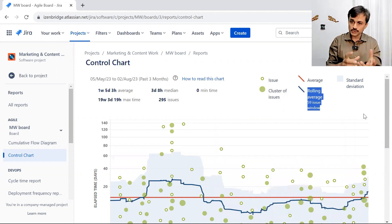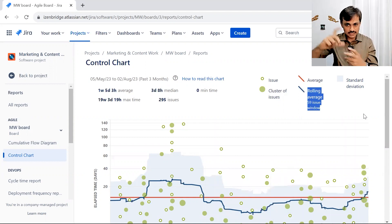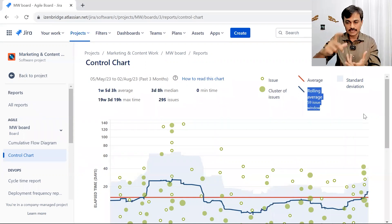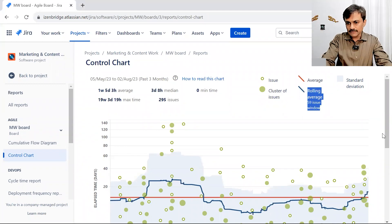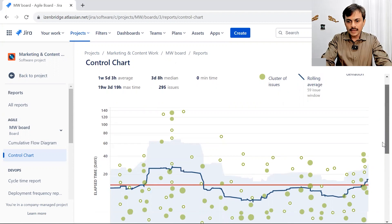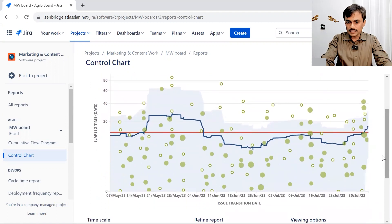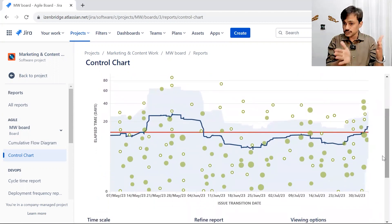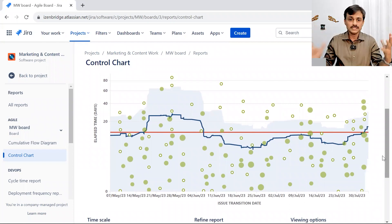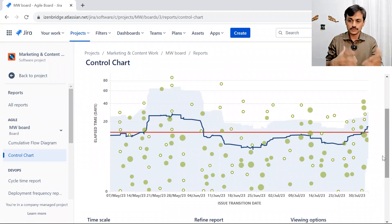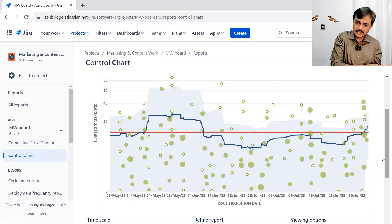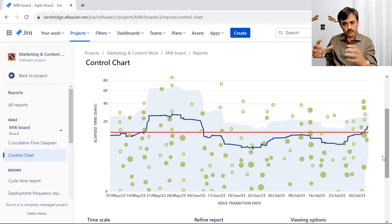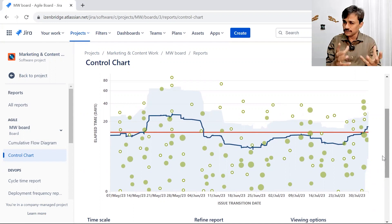Now, standard deviation. As you know, standard deviation is a factor showing how a particular instance is deviating from the mean or average value. In the chart, standard deviation is shown as a shaded area. If the range is narrow, it's good. If the range is wide, predictability is poor — there is a lot of variation; sometimes the time is less, sometimes more, making it difficult to predict.